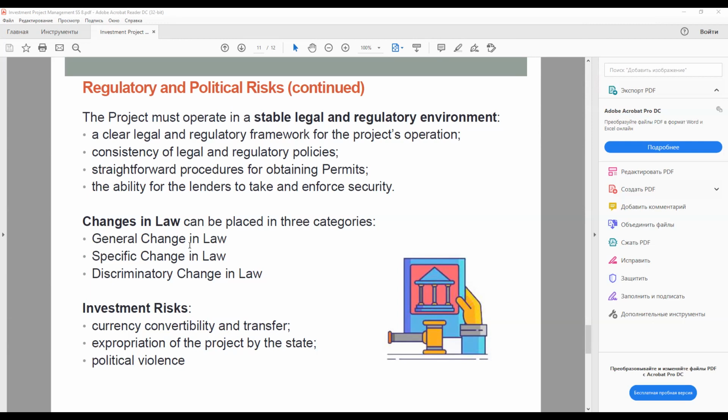The risk of change in law, that is regulatory risk, therefore needs to be considered for any project, wherever it is located. In this context, law includes anything having the force of law, and so would include, for example, industry regulations. An adverse decision by a court affecting the project company's costs, rights, or revenues may lie outside this definition, because it could be argued that the court decision does not change the law, but only correctly interprets the law as it stands. And needless to say, most courts would present their decision in this way. Including changes in interpretation of law in the contractual definition of change in law may provide some protection in this respect.